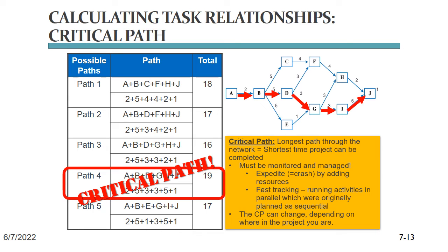And if that weren't the worst thing, how about this? If any of the other tasks take much longer than planned, this critical path can change too. You probably already guessed that babysitting the critical path is one of a project manager's most important jobs. And you'd be right.